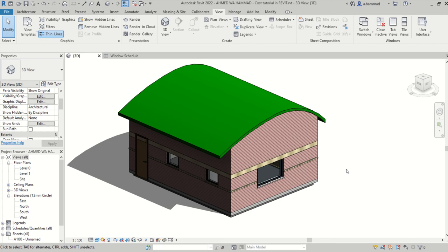And the other approach is if I have a wall that's consisting of several layers of materials, then I can associate a per meter squared unit cost with each material type that's present in the wall. So I'm going to show you how to do it in both ways. Let's start with the total per meter squared unit cost that you would associate with the wall.